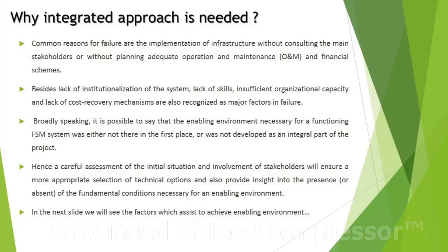Coming to the question, why is an integrated approach needed? The common reasons for failure are the implementation of infrastructures without consulting the main stakeholders or without planning adequate operation and maintenance and financial scheme. Besides, lack of institutionalization of the system, lack of skills, insufficient organizational capacity, and lack of cost recovery mechanism are also recognized as